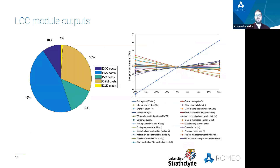To give you an idea of the types of outputs, here we can see the breakdown of life cycle costs based on the different phases of a project's development, as well as the sensitivity analysis of key input variables illustrating the ones having higher impact to the KPIs of interest, which in this case was selected to be the net present value.